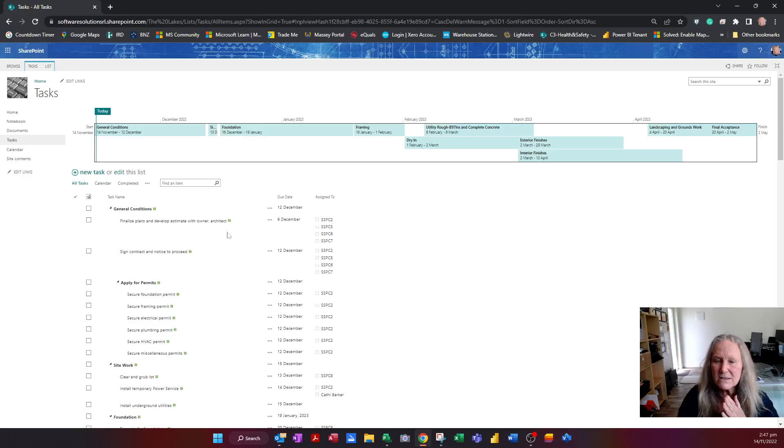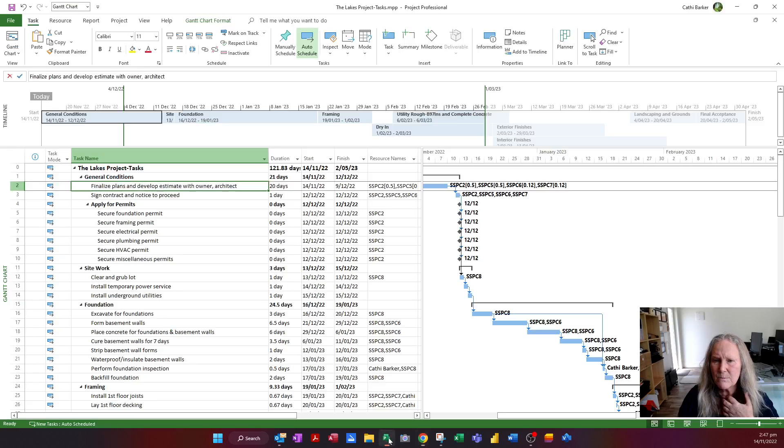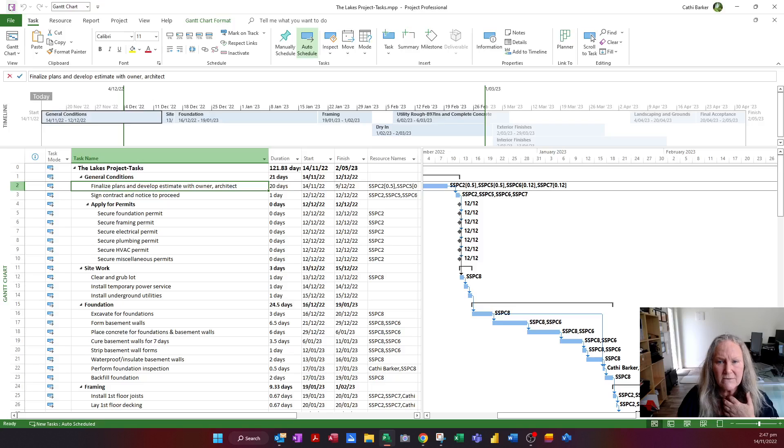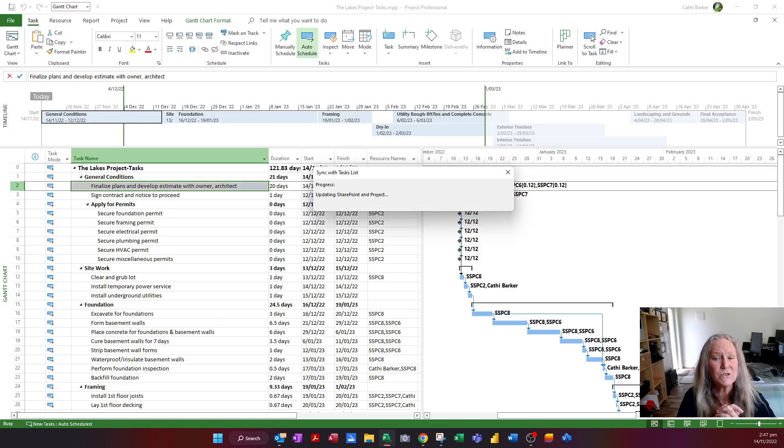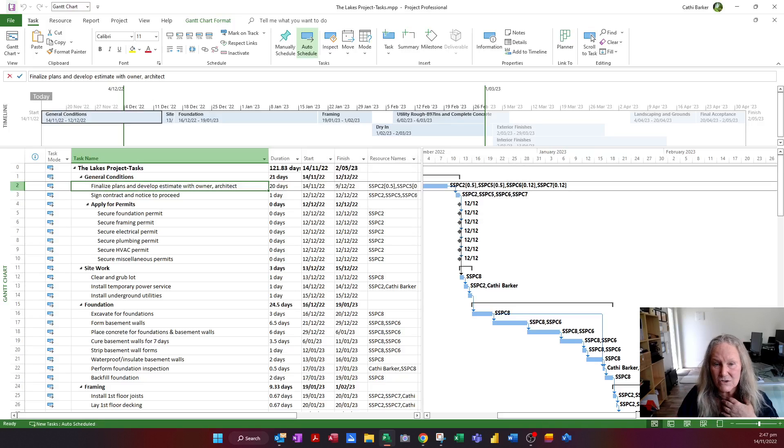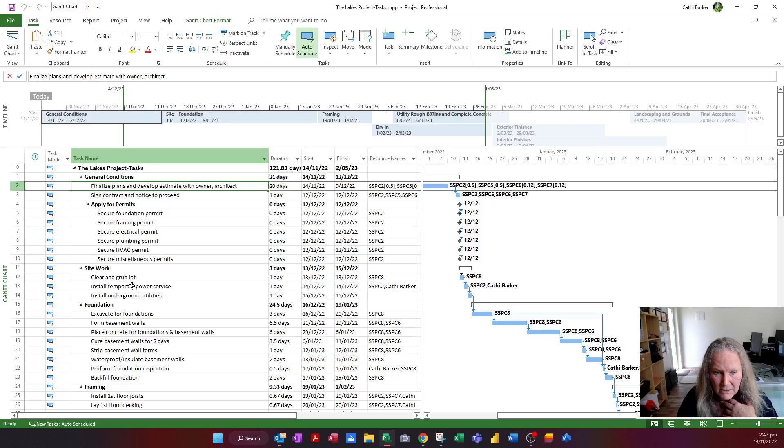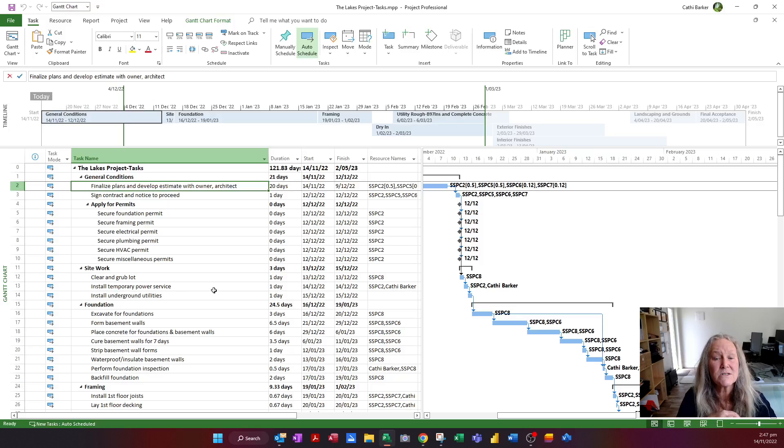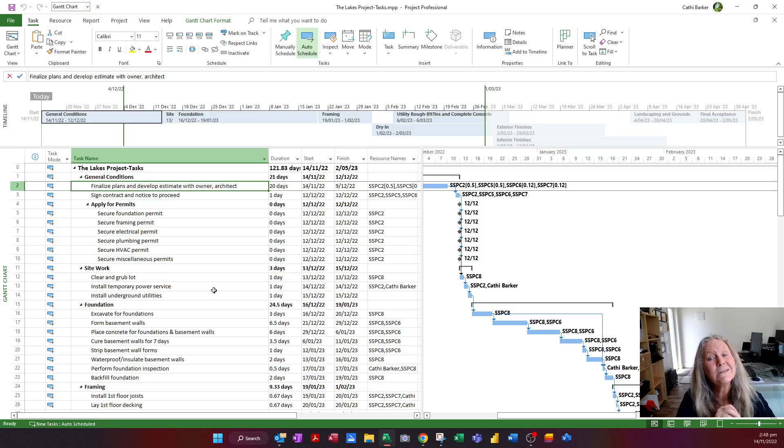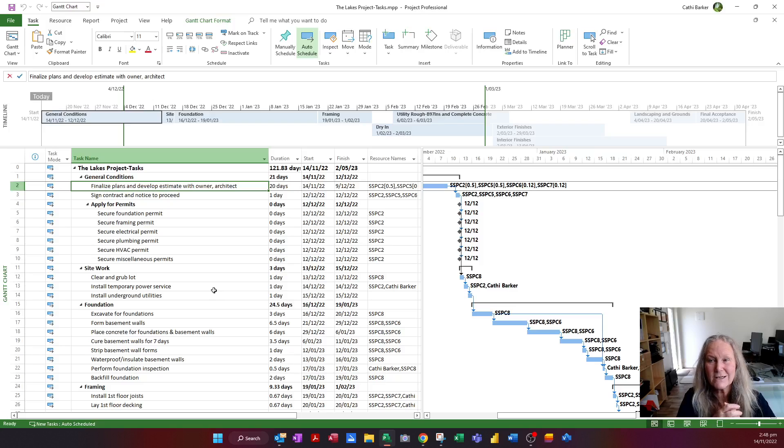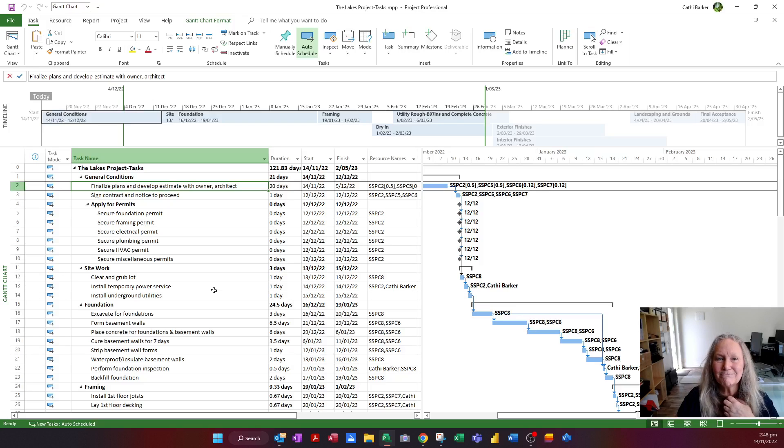So let's look at that as well. If I jump back to Project and I actually hit the save option, it will actually update the project with any changes. I just saw myself and SSPC2 appear here and get assigned to installing a temporary power service. Really, really good. Use SharePoint to keep your project plans up to date.